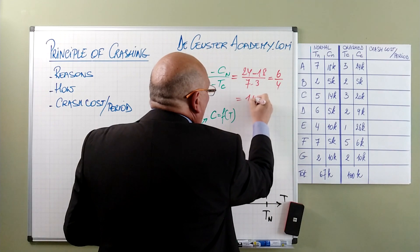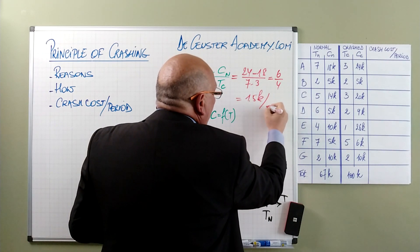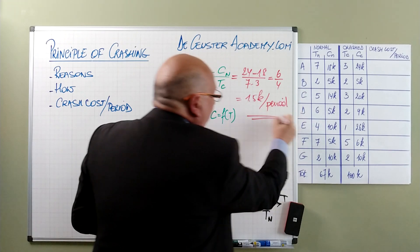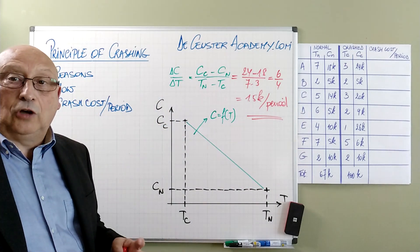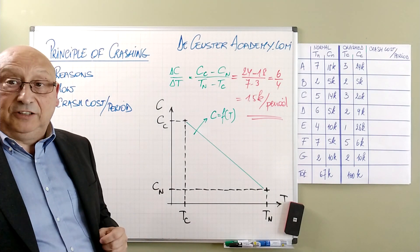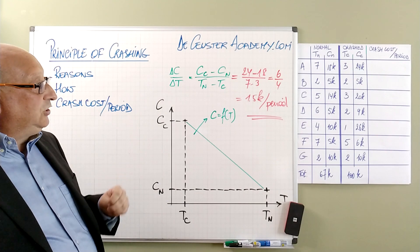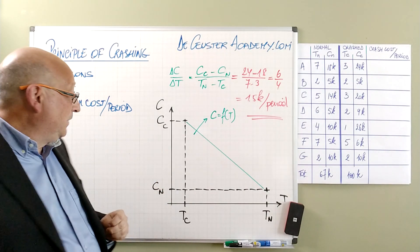Which gives us 1.5K per period. So that's the first calculation that we have to complete to see what's happening with those activities. That's what activity A. Let's have a look at the special case of activity B.